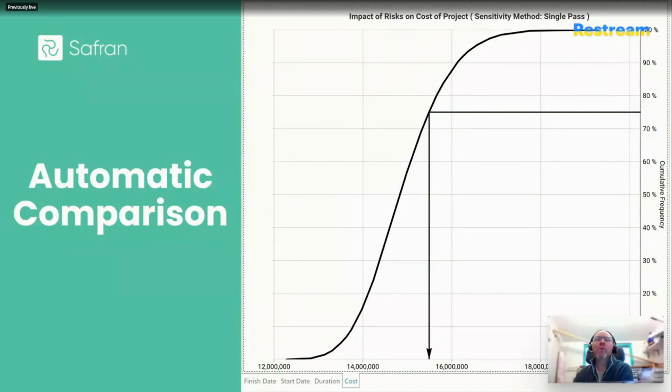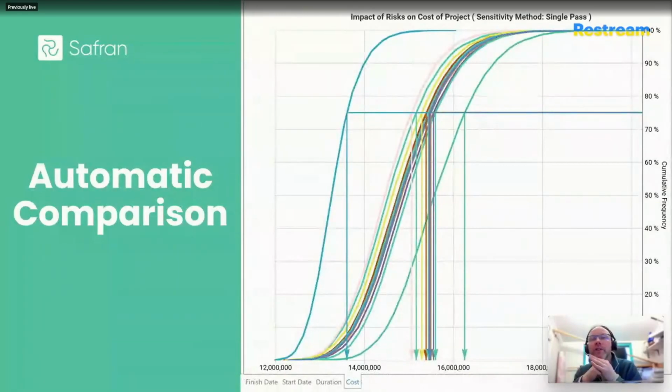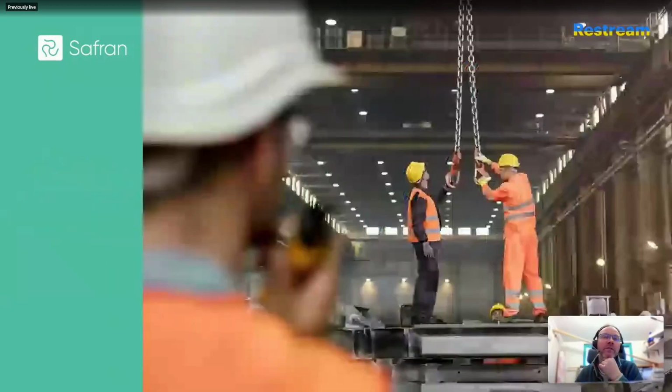But also you can toggle whether or not the various sources of estimating uncertainty in the schedule and/or the cost model are grouped together and treated as a single risk, or as individual extra risk drivers in their own right. So that's another possibility. But furthermore, if you want to speed up any sensitivity analysis, you could always use the convergence tools from the main simulation setting to learn how few iterations you could potentially be getting away with. So, why run 10,000 iterations of Monte Carlo if you can yield the same outcome at just 1,000 iterations?